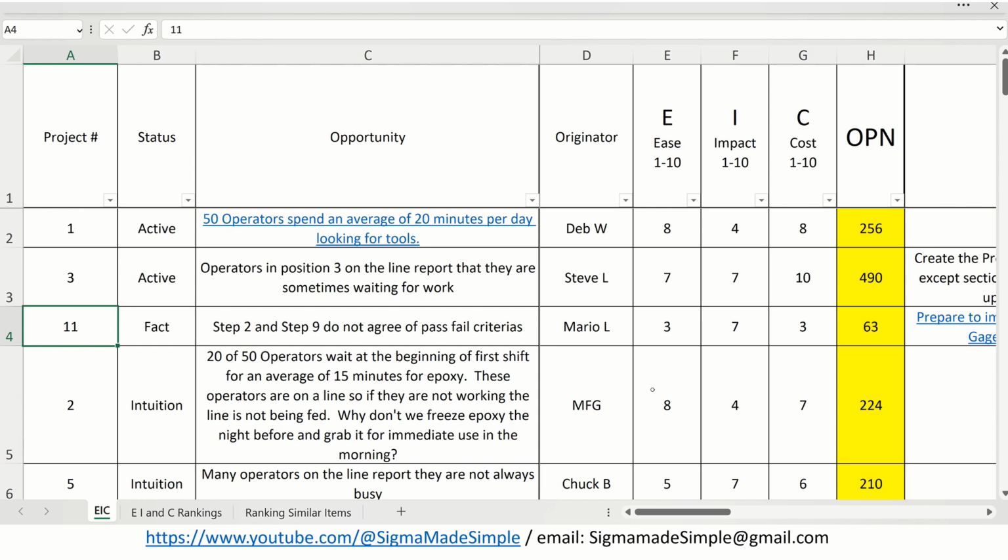So this is where we decide on going inactive, or do we do an additional step or additional tasks and then go inactive. And the team has decided to do some additional tasks for a few reasons. One, the equipment is new to the market and it's leading edge. So it's really one of a kind and it could be a game changer. It'll take about 30 labor hours to review an attributes gauge R&R and see what the results are when we try out this new equipment. So we figure we can spend 30 hours to try to figure out if we can get something out of it.